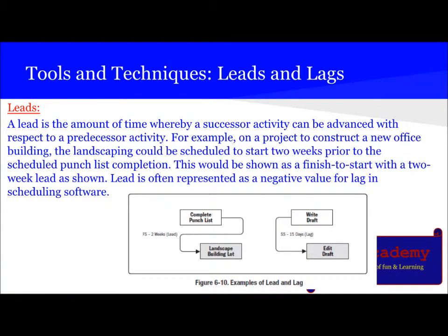Now let's learn about the other two techniques, which are leads and lags. What are leads? A lead is the amount of time by which a successor activity can be advanced with respect to the predecessor activity. For example, on a project to construct a new office building, the landscaping could be scheduled to start 2 weeks prior to the scheduled punch list completion.